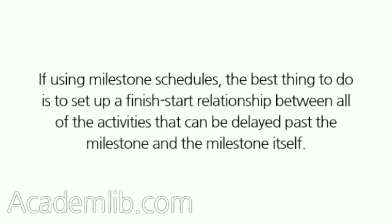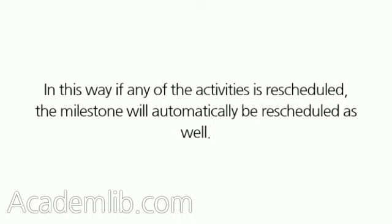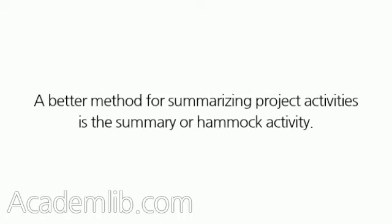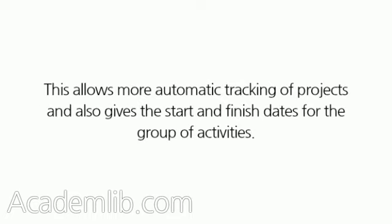If using milestone schedules, the best thing to do is to set up a finish-start relationship between all of the activities that can be delayed past the milestone and the milestone itself. In this way, if any of the activities is rescheduled, the milestone will automatically be rescheduled as well. A better method for summarizing project activities is the summary or hammock activity, which allows more automatic tracking of projects and also gives the start and finish dates for the group of activities.